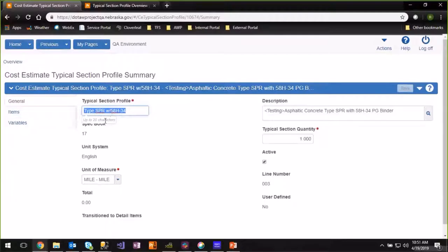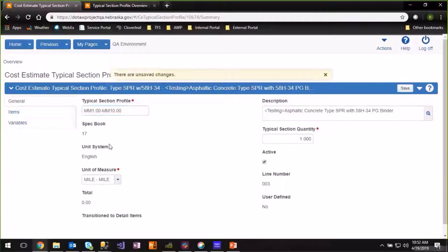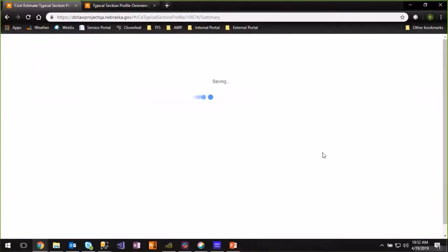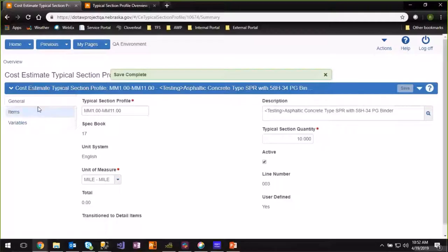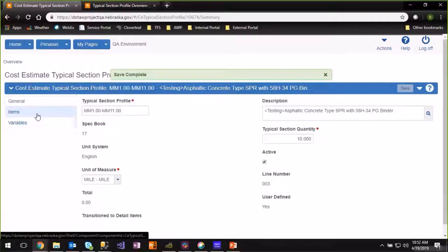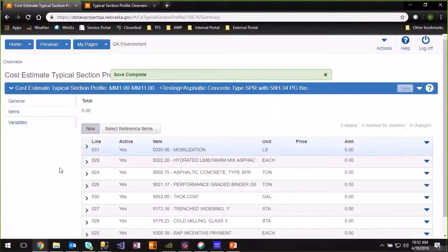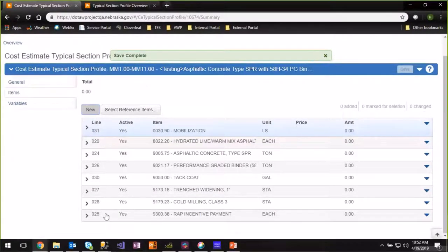To get into the typical section and start working with it, click the blue hyperlink on the name. Your documentation will probably direct you to rename it — for asphalt, it would be whatever mile markers it runs between. Since we have 10 miles here, we'll go ahead and change our typical section quantity to reflect that we're going to do 10 miles of work. Once you've done that, hit Save. Along the left are your different components to the typical section: the general screen, and then items and variables.